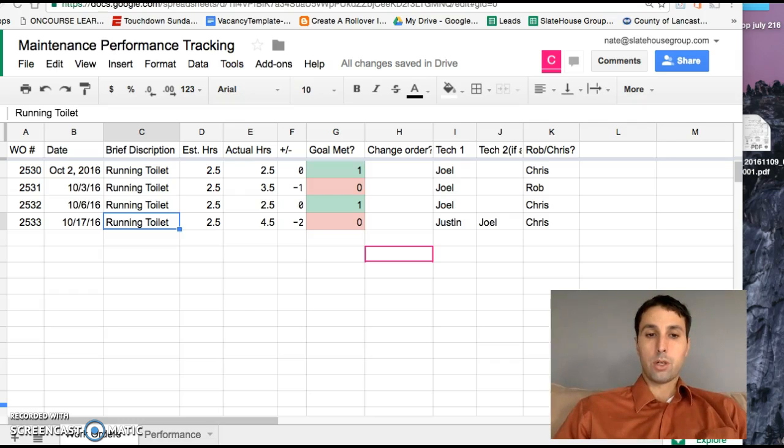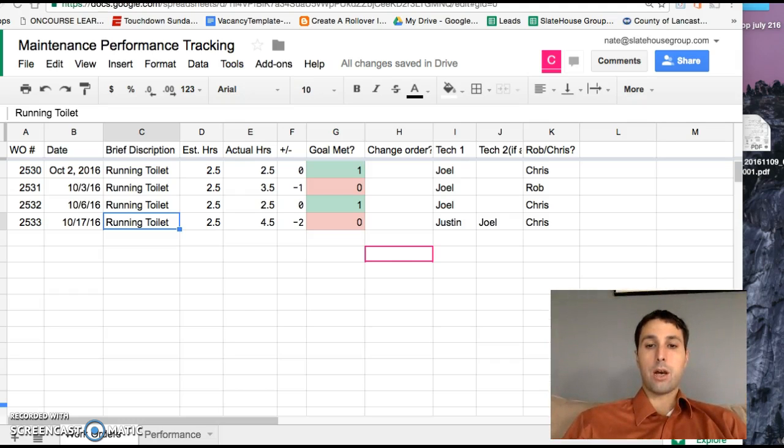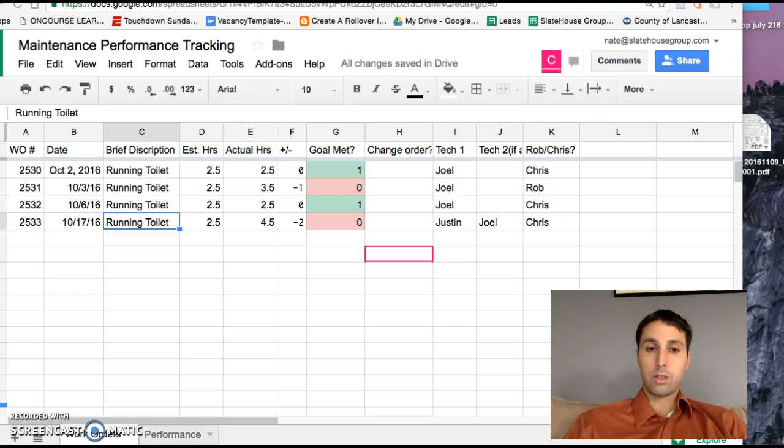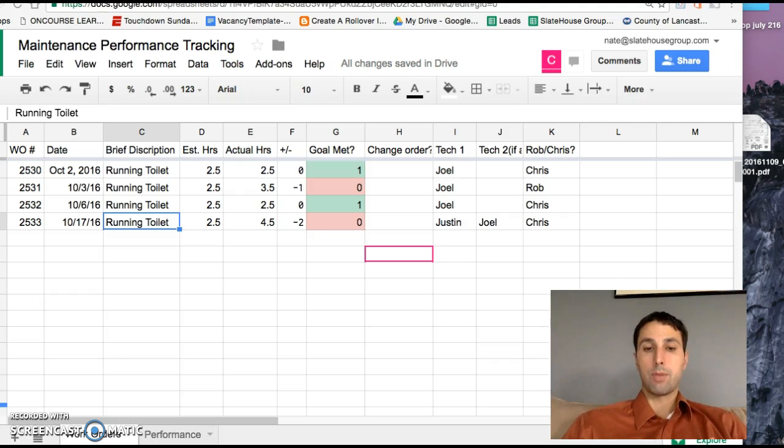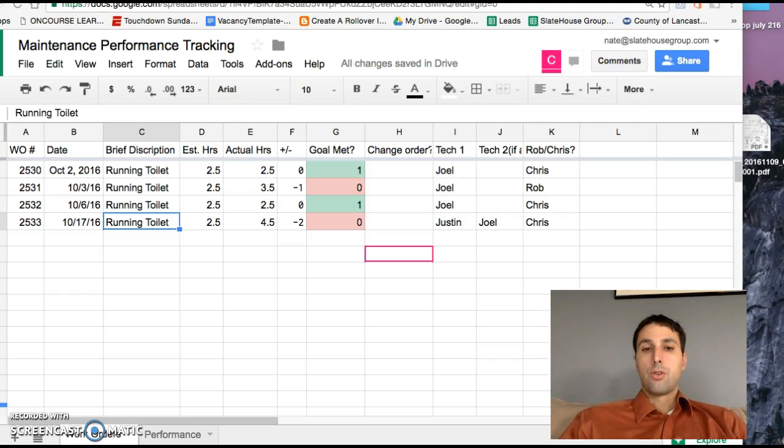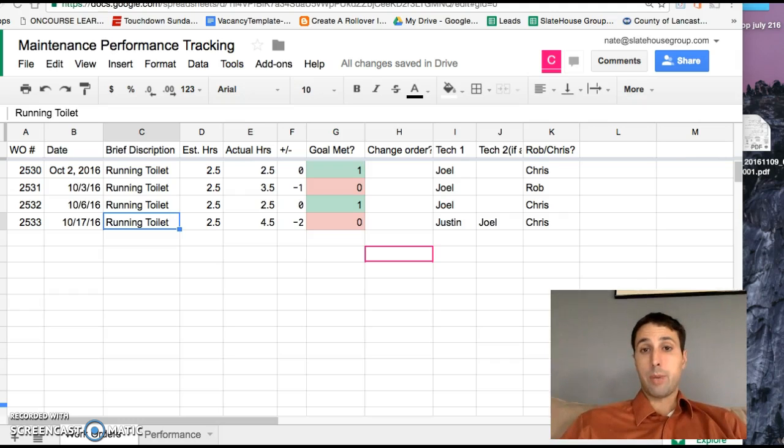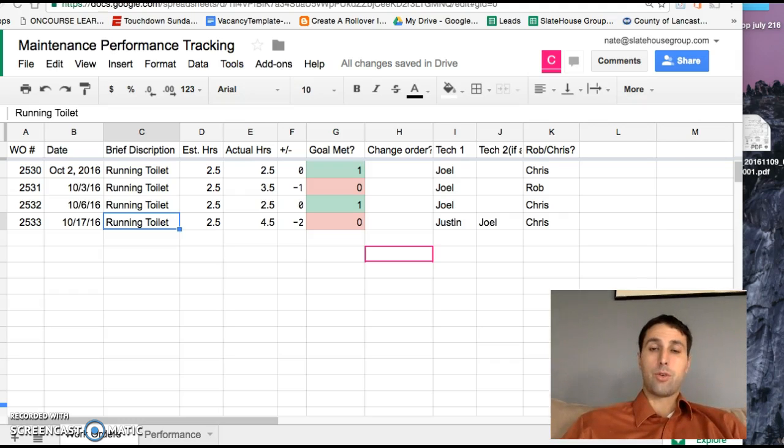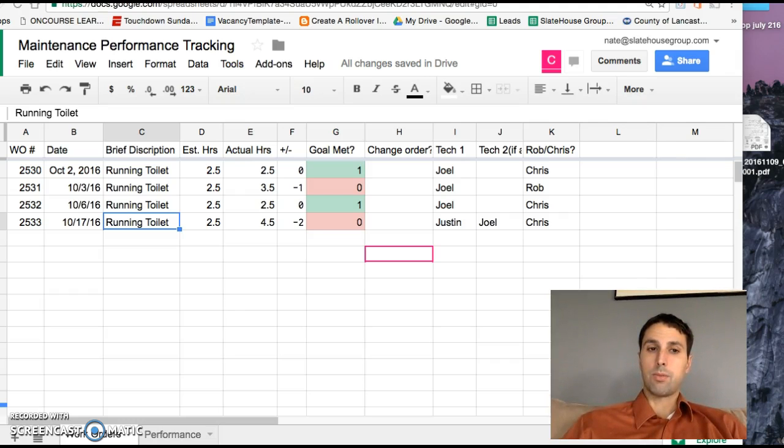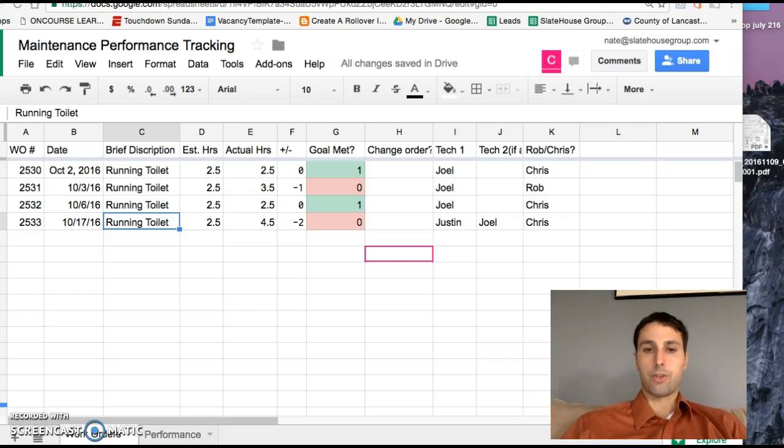So what we're going to do pretty simply is every job that you go to do will now have an estimate on it, an estimate number of hours and material costs. That way before you even start the job you know what we're expecting so that you don't go into it blindly. That way when you're done with the job we're not frustrated, you're not frustrated, we're all on the same page.